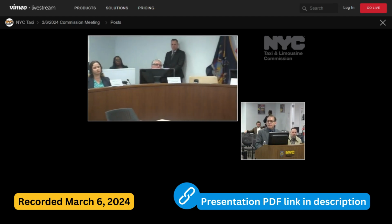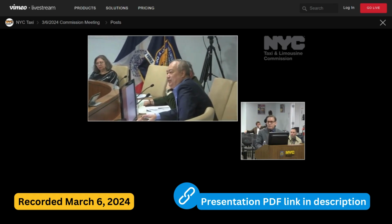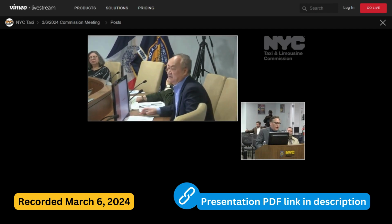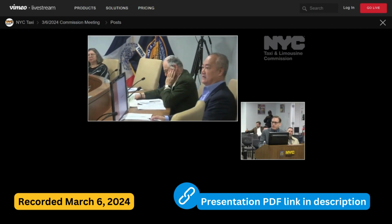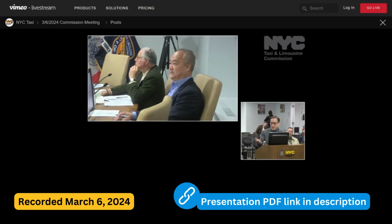Are there any particular reasons why we wouldn't use level 3 chargers for all 70 EV chargers? Yes, the site couldn't handle it. We worked with Con Ed for quite some time to figure out the maximum number of level 3s that we could put in. They didn't think originally, the discussion was something like 40 in total. But we kept pushing and they actually were able to figure it out, and the grid could currently handle it.